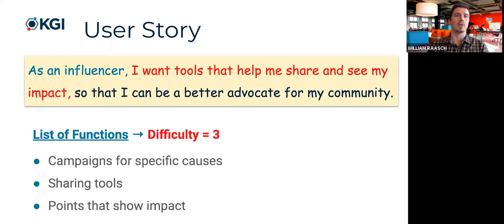So it's all relative. There's no absolute objective answer of what a difficulty rating should be. The only absolute objective answer that I have for you on difficulty is that it needs to be a number created by that team based on what they feel their capabilities are and how hard the problem is to solve. So they all have buy-in, and then that enables them, as they start to rate their velocity or their efficiency as they go through the sprint backlog, to know, well, we said this was going to be hard, and it turns out that it's taking a little bit longer, but that's okay because we assigned it a high difficulty. Does that answer your question? Okay, great.